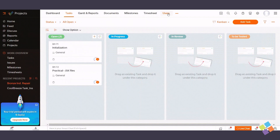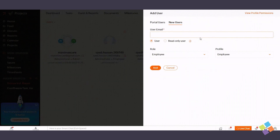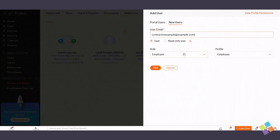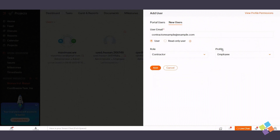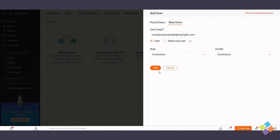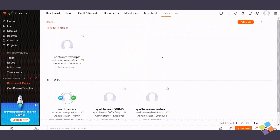Contractors play a crucial role in project execution. To include contractors, access the Users module, select Add User, assign the user a contractor role, and set their profile as a contractor. Click Add to confirm.